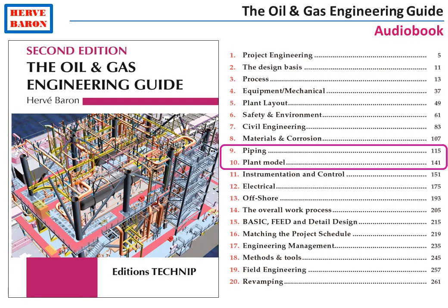Welcome to chapters 9 and 10 of the Oil and Gas Engineering audiobook. These chapters describe the work of the piping discipline. Pipework is the most common critical path of oil and gas projects. It is therefore very important to understand the sequence of work of the piping discipline, which is the purpose of these two chapters.